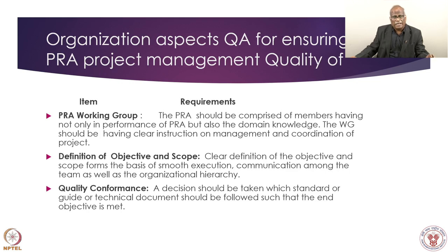Are the objectives addressing the resources that are available? Because if they are not matching, then probably it will be difficult to meet the objective and scope also. Scope is designed based on what we want out of this PRA, what kind of benefit we want to draw: is it for regulatory purpose, for compliance, or do we want to develop some application? If we want to develop some application, then the scope will go that way, or it will expand, and it will require a further level of review. And finally, of course, approval will come from the regulator only.